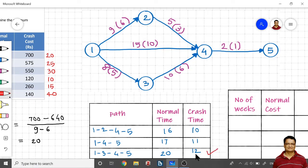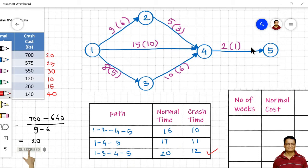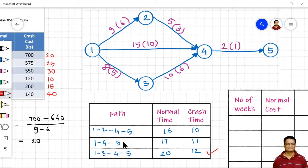This critical path can be crashed up to 12 days. When crashing a project, by paying some extra amount, we reduce the duration of the project. While crashing, we must select activities that are present on the critical path — that is, path 1-3-4-5 for crashing.